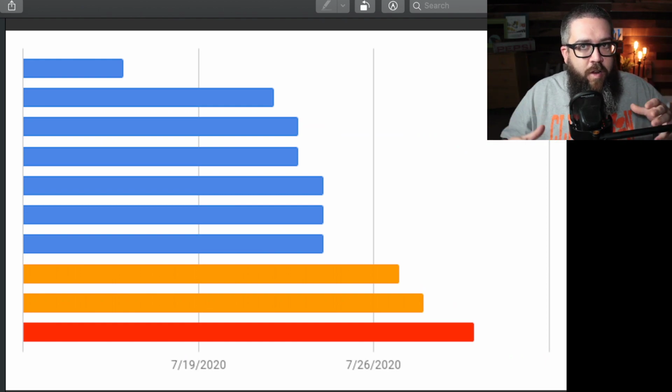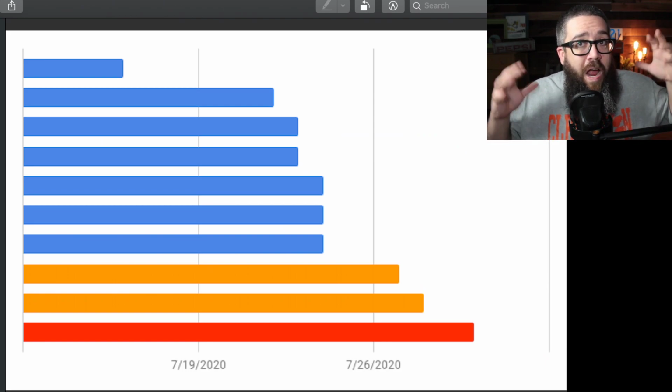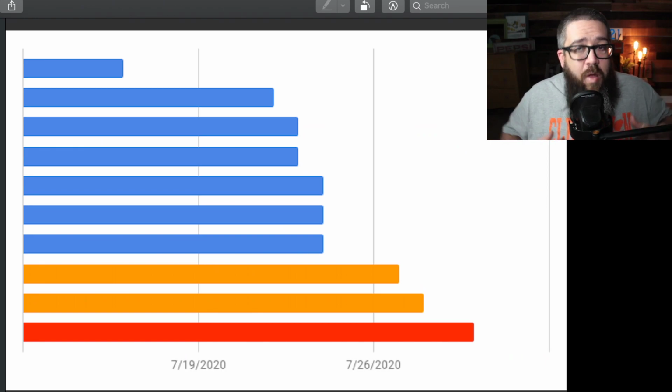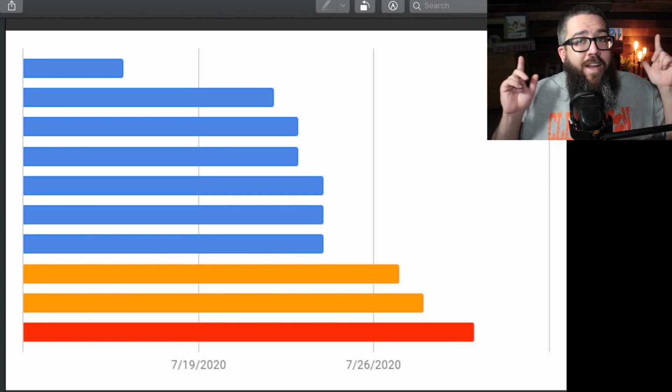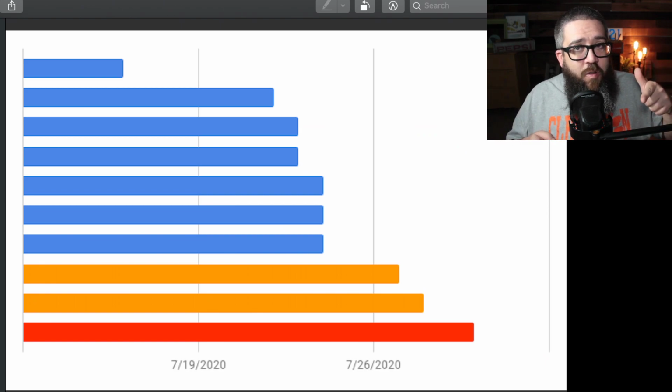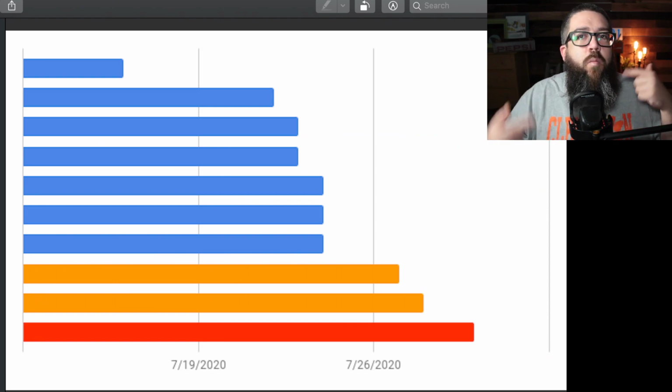And so then after I look at those, I want to go back to the product owner and say, hey, product owner, see those other stuff we're working on? We're actually going to stop working on that because we want to reduce our WIP. We're going to get these 3 things knocked out. Oh, wait. They're not important anymore because we sat on them too long? Got it. So we're not going to do those 3. But what we will do is the next 3, and so we're going to prioritize better. We're going to set some WIP limits.